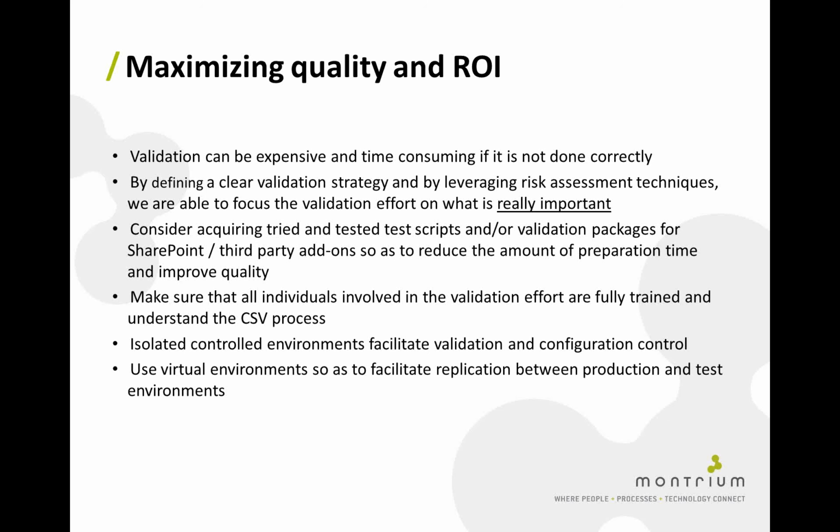This really facilitates validation because we're really just focusing on those controlled environments, and it also facilitates configuration control because we're not having to put everything through change control, but you do need to have an architecture which will allow you to do this. And then finally, it's recommended to use virtual environments. This is especially useful to be able to replicate your test and production environments, especially when you're doing changes. It's also very good, of course, for disaster recovery.